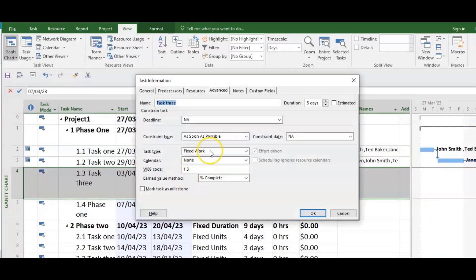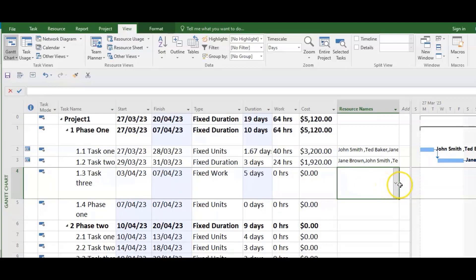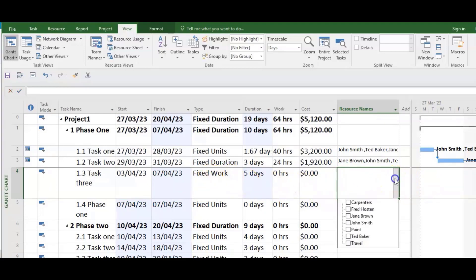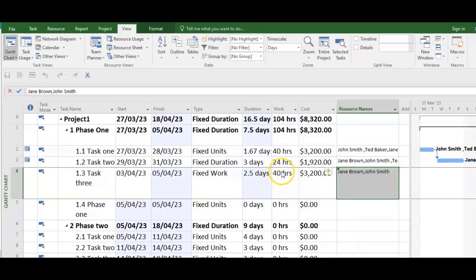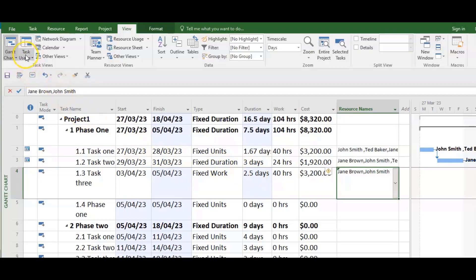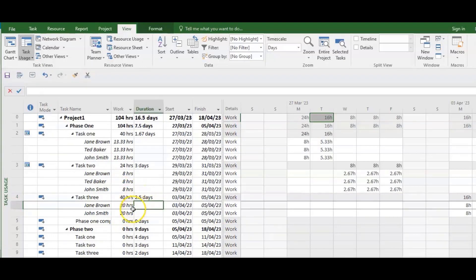Now let us look at Fixed Work. Fixed Work is effort-driven by default — that option is grayed out. Work automatically reduces as you add resources. So let us add Jane — 8 × 5 is 40 hours. If we add John it's still 40 hours, but the days have been reduced because it's assumed that as you add more resources the duration reduces. It reduced from 5 to 2.5 days. Looking at Task Usage, we see two resources each getting 20 hours of work, and duration has changed from 5 to 2.5.